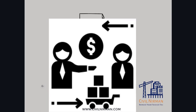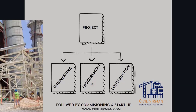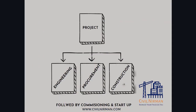Procurement purchases all the equipment and materials based on the list and specifications prepared by the engineer. Construction erects all equipment and materials purchased by procurement, as per the drawings and in accordance with the specifications produced by the engineering part.